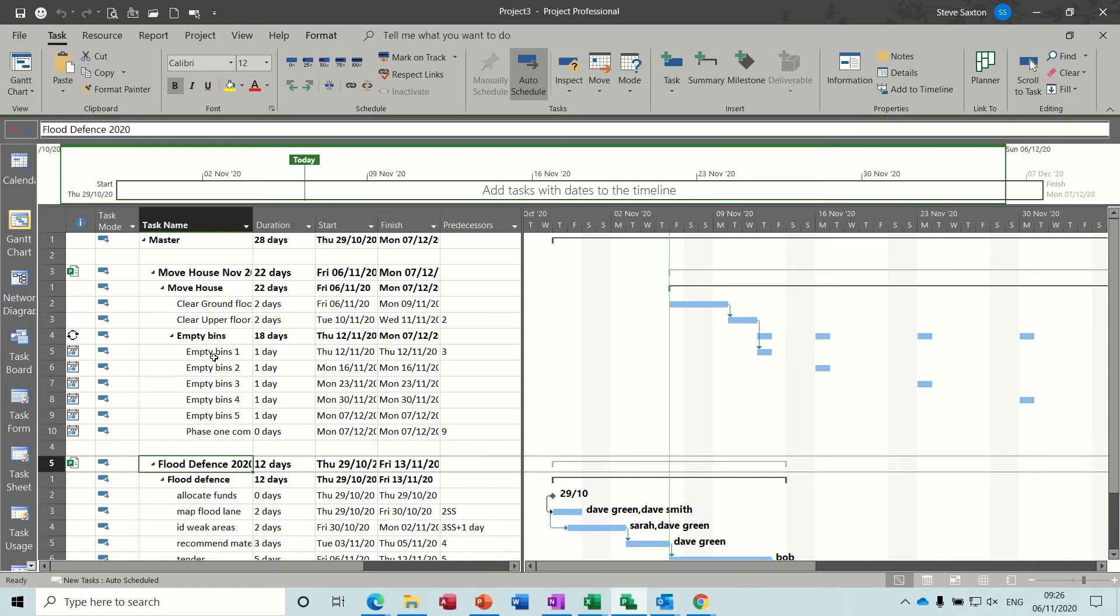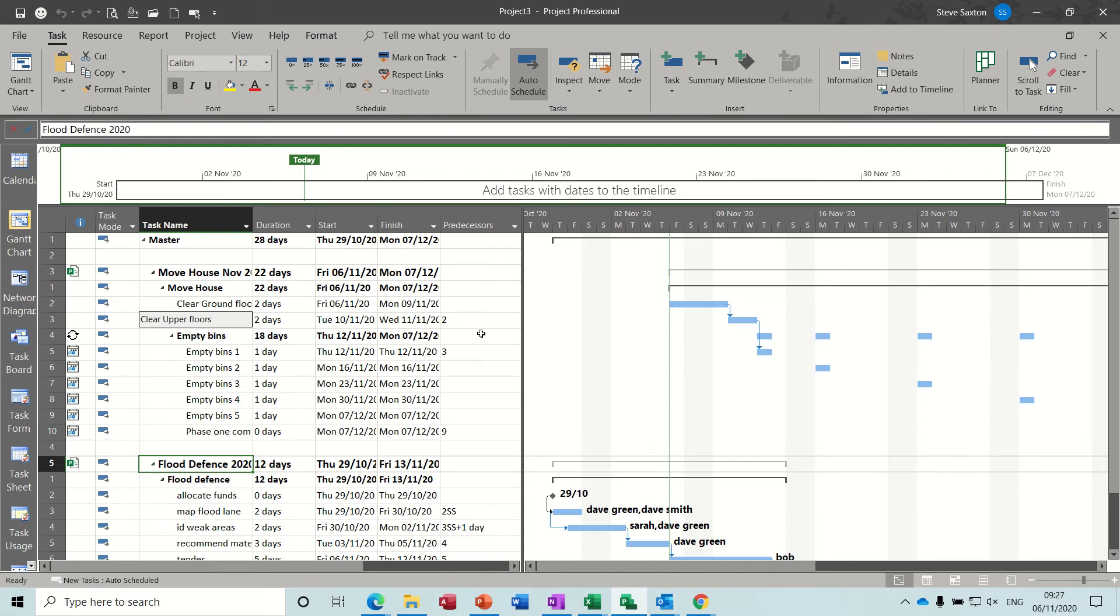What you're doing here is you've created a master file but you can actually work on these projects through this master file but you can also work on these projects in isolation by just opening the source file and working away on it. Because this is a live link any change made at either end will be reflected at the other end.